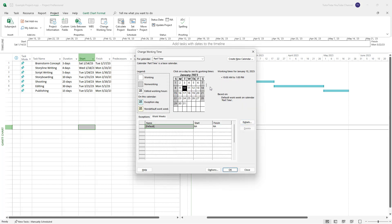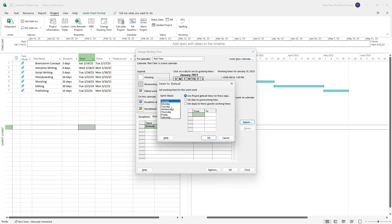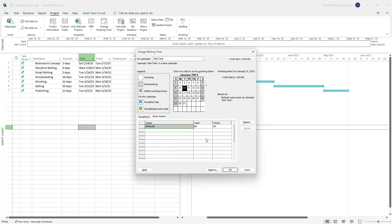Once I do that, this is what you have. If I go to Details, you can see Saturday and Sunday are set to nothing, and everything else is set accordingly. So the Part Time calendar is configured as 10am to 1pm on working days.